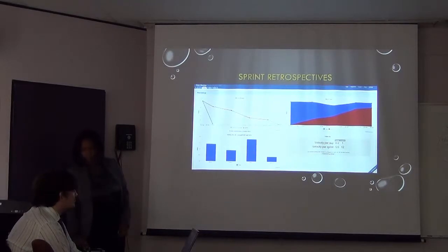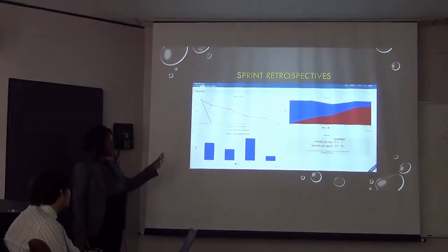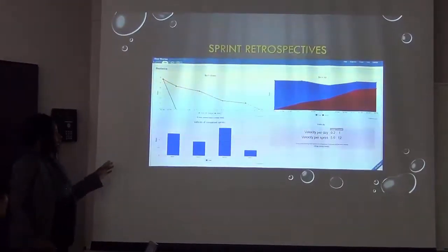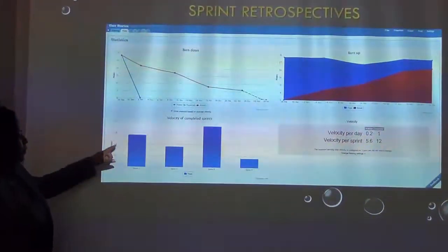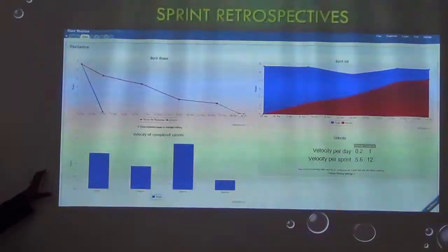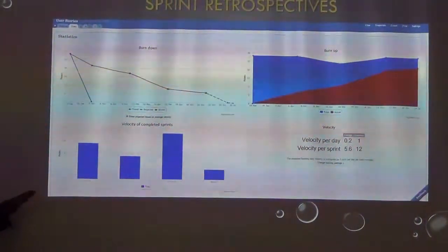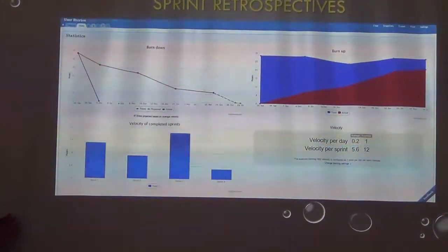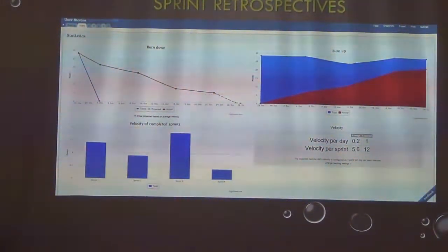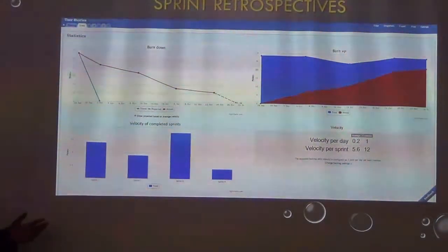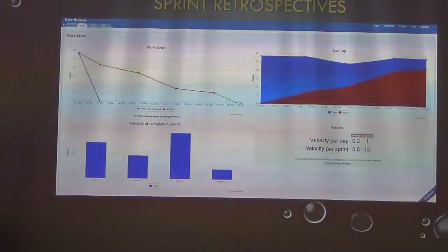For the sprint retrospective, there are screenshots in the main domain document, however we're just going to highlight the main one here. In Sprint 1, there was much progress, as you can see, as we completed most of the user stories. In Sprint 2, the velocity decreased as we were now carrying over some items from Sprint 1 to Sprint 2. In Sprint 3, we managed to increase our velocity and caught up on the work that was behind.